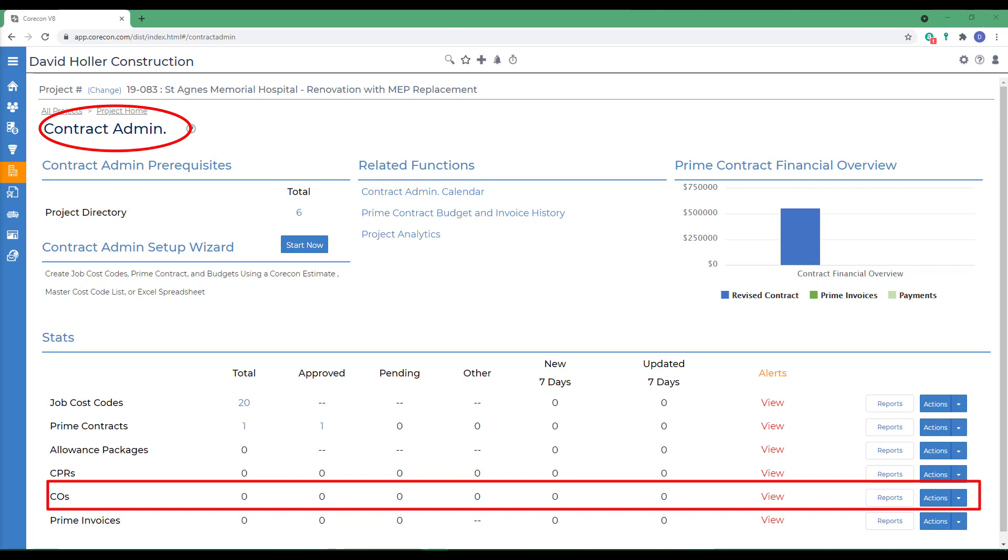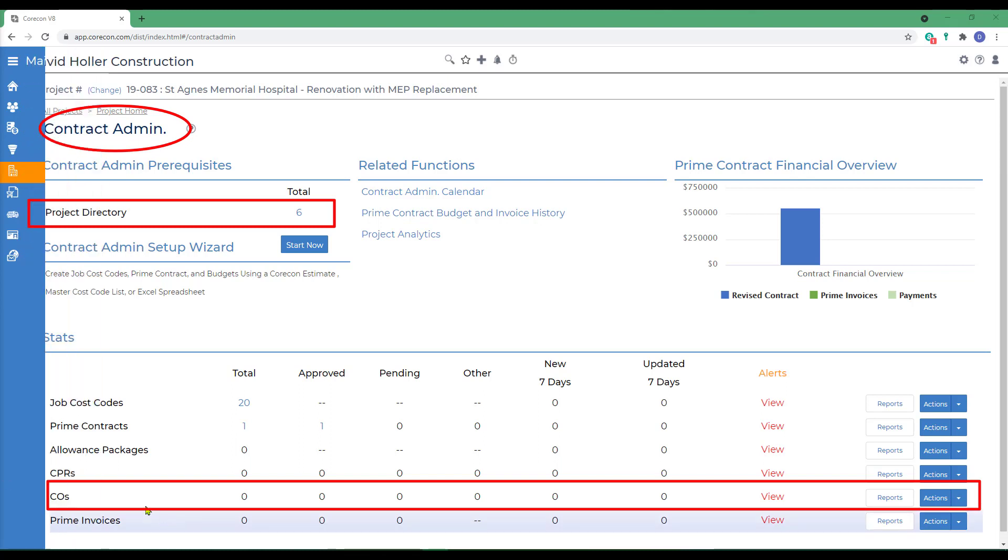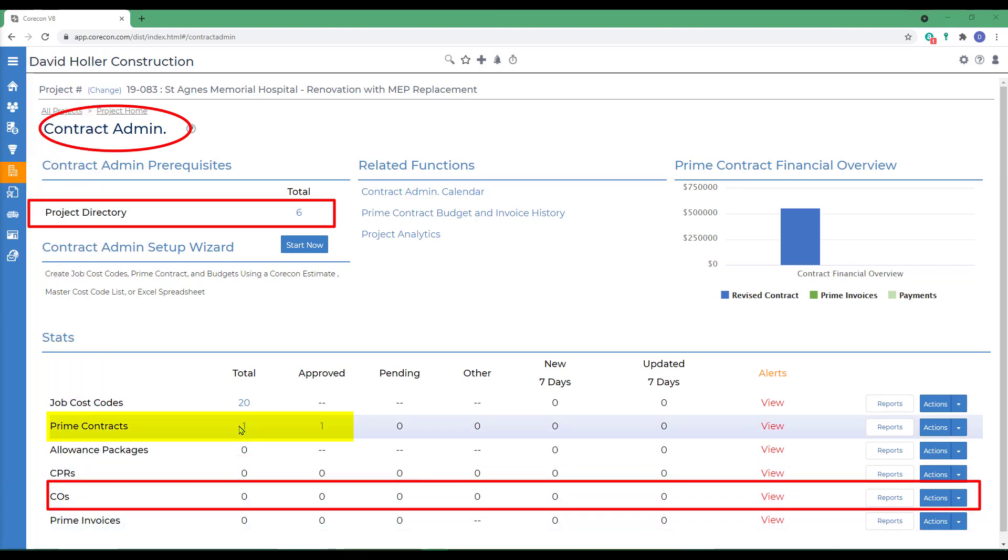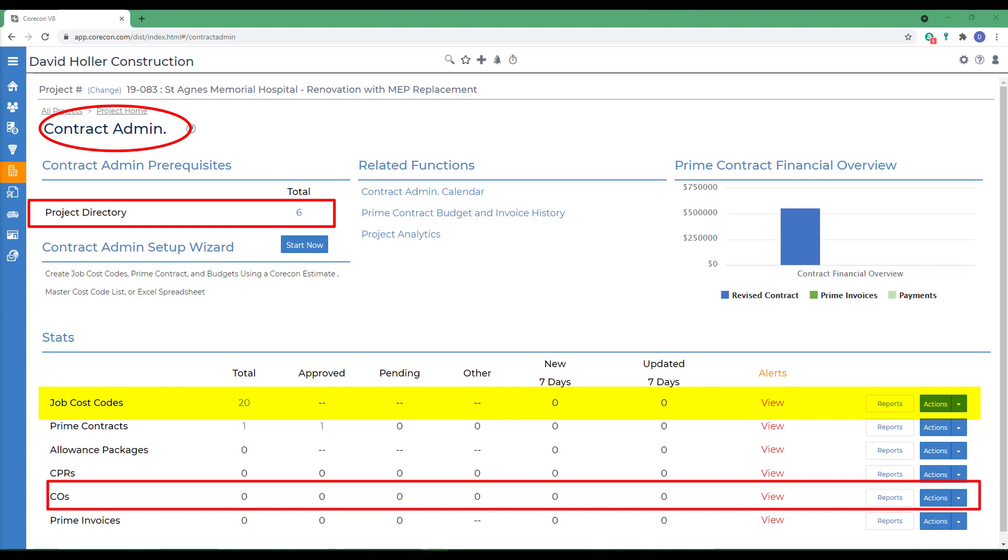A few reminders. Before you create a Change Order, make sure that the project owner or customer that will be reviewing the Change Order is also listed in the Project Directory. A Change Order must have an approved prime contract. Job Cost Codes must be established as are referenced on the Change Order proposed items. If they're not already in this project-specific job cost code list, they can be added from the Actions button.